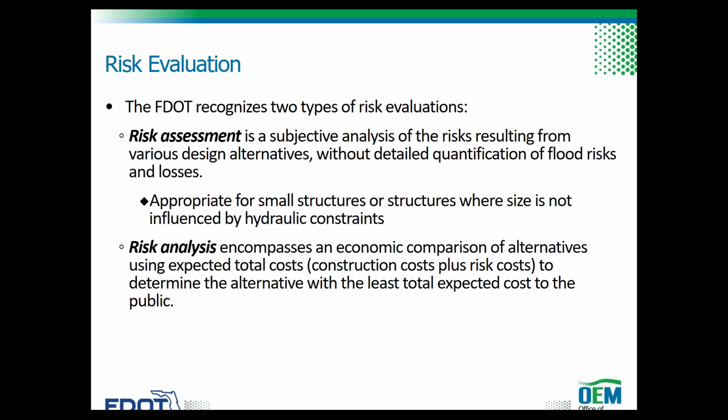Risk analysis is an economic comparison of the alternatives using expected total cost that combines construction costs and risk costs to determine the alternative with the least total expected cost to the public. It should include probable flood-related costs during the service life of the facility for highway operation, maintenance and repair, for highway-aggravated flood damage to other property, and for additional or interrupted highway travel. See Chapter 4 of the Drainage Design Guide for more information on this evaluation.